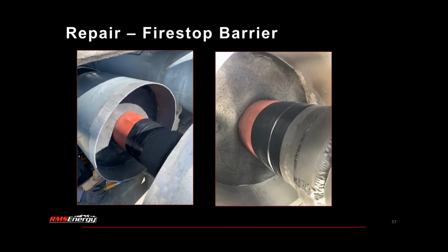Before it was repaired, the outage was about 8 weeks long. They had to replace the starter cabinet as part of it, along with cryogenic cleaning and repair of the bus duct. So it was significant downtime and hundreds of thousands of dollars to complete the repairs.